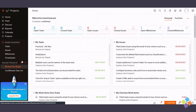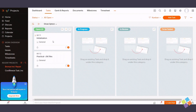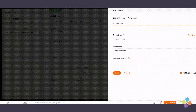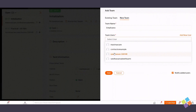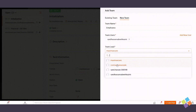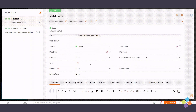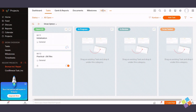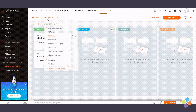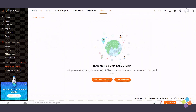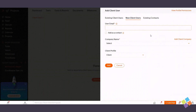Employees are integral members with limited access. To engage employees within a project, invite them as team members to grant them controlled access to project data. Clients are external stakeholders with limited access. To involve clients, navigate to the Users module within a project, choose Client Users, and extend an invitation to them.